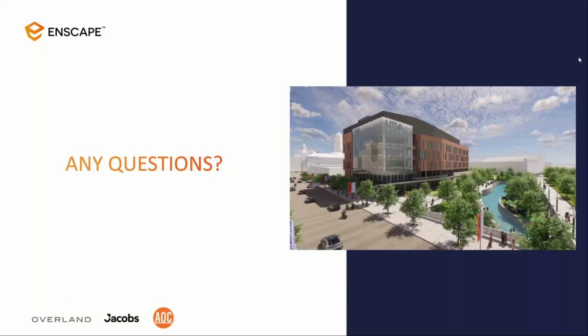And so Austin, Fort Worth, DC, they were all over the place, and they were able to flex their team. Jacobs were on point for our MEP design. We had AV, IT security, landscape. What do you think, about 20 to 30 at any one time in the middle of it is kind of the average? And I think it's important to note it's 176,000 square feet, maybe plus, 6 stories, and the timeline for the design was June to December in terms of the production of it.